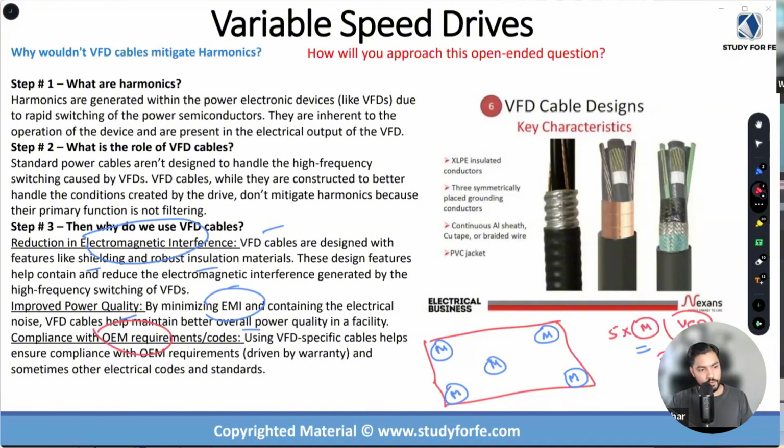step into my contingency fund and accommodate something that is not accounted for? And in your defense, you're like, okay, in the initial phase of the project, we didn't even know. The best that I was told was that there were going to be X number of motors, and the layout was all floating. We didn't know where these motors were going to be placed. So a conservative estimate was, let's say, 100 feet of cable. But when the layout got frozen and fixed and other aspects of the project were fine-tuned and defined, now each one of these cables is actually 300 feet long.